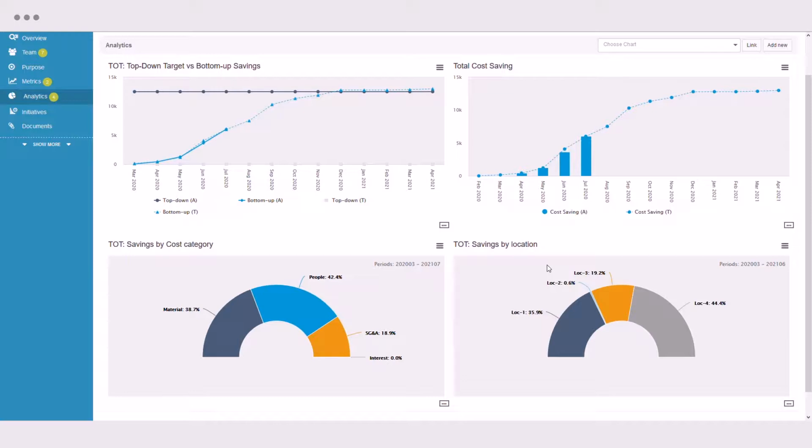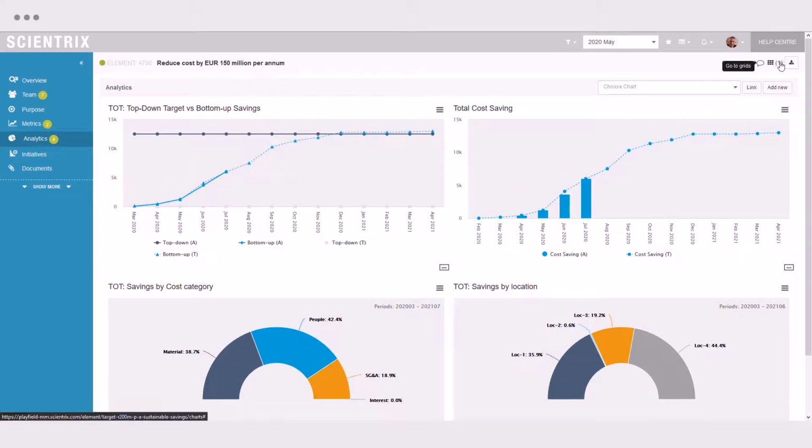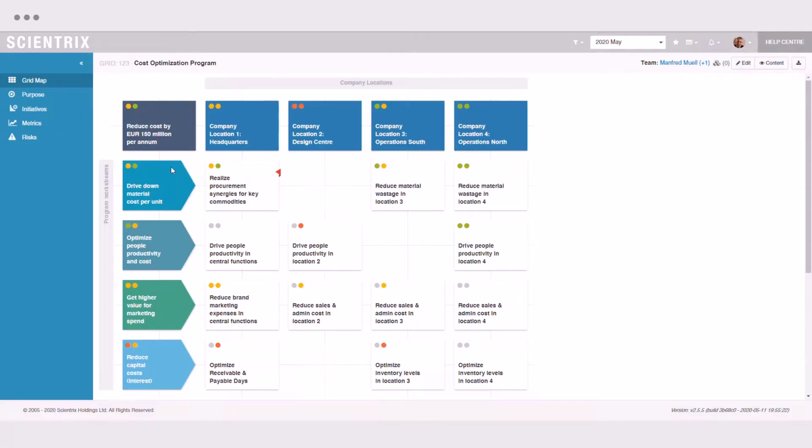It is recommended that each action owner periodically updates progress, budgets, and savings of their actions. This allows for the easy monthly tracking of the status and success of the overall program. When we want an overall view of the program, we can also analyze the situation of each of the focus areas to determine if there has been any improvement compared to the previous month. We do this simply by comparing the current and prior period RAG status.